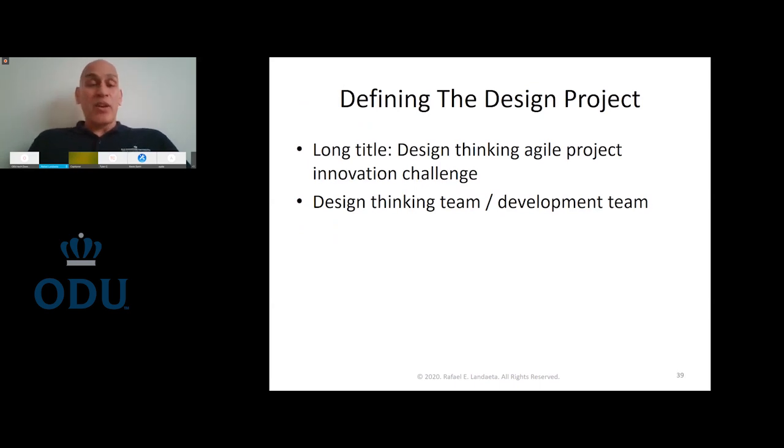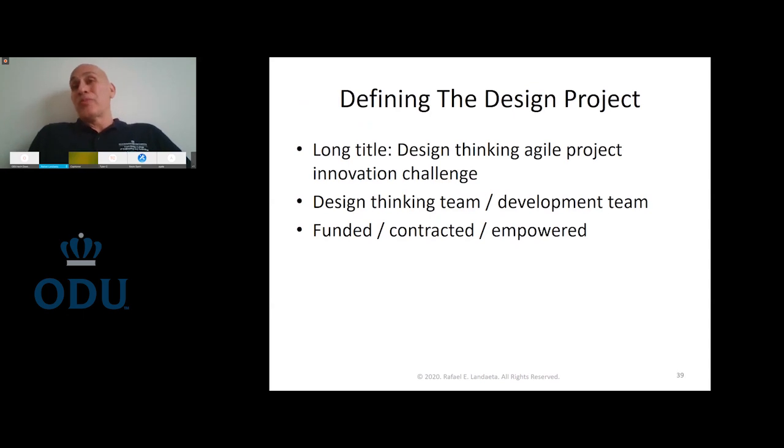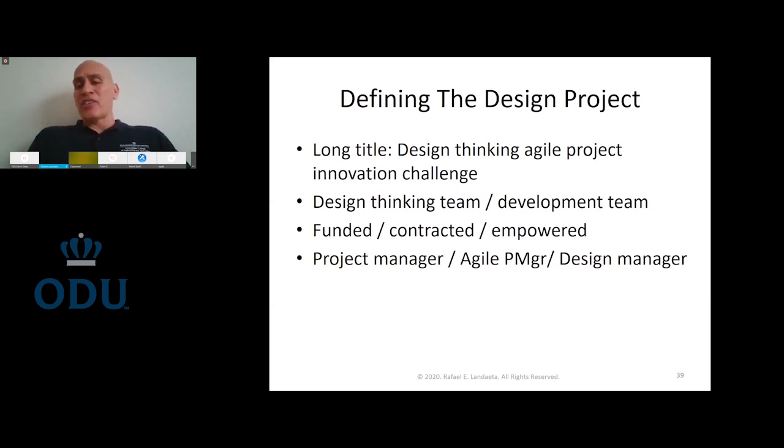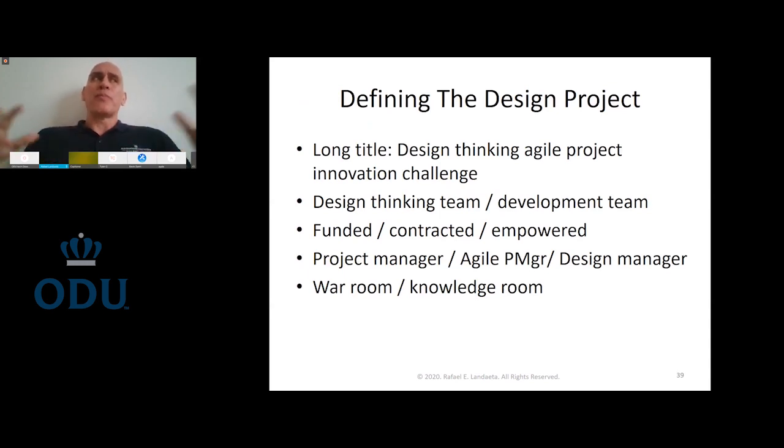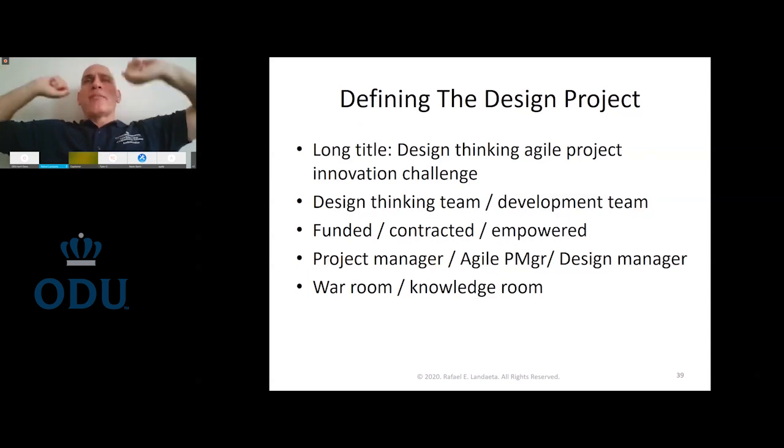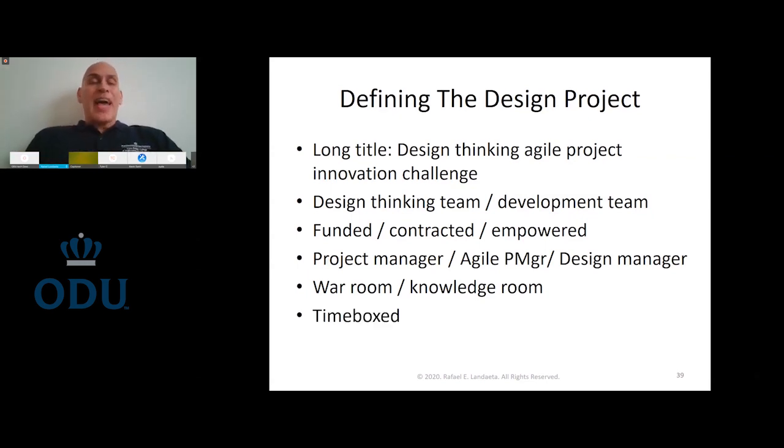You have a design thinking team or a development team. You have a funded contract, or you're on your own time trying to become your own boss. It has a project manager or an agile project manager or a design manager, a single person responsible for the performance of this project. It has a place, which some call a war room. Some other people call it a knowledge room, where people can put stickers on the walls and co-create, and be close to one another. Of course, now in pandemic times, everything is virtual. And it has a time box. The time box is a nice concept to define time constraints. It boxes you in terms of time, and these time boxes help you make sure that you are on track.